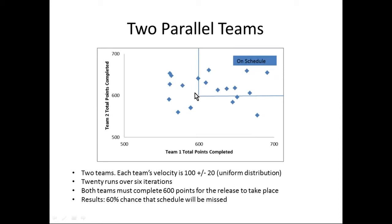This demonstrates the problems with the standard approach, which would say we'll complete 600 points on both teams and be on schedule — when in fact there's a 60% chance the schedule will be missed. What's really powerful about Monte Carlo is that we know this on day one, before the project starts. We can make a much better decision about whether to invest in it. Using the standard approach, you'd basically have to watch the situation unfold over several iterations before discovering the team isn't finishing 100 story points per sprint — spending a lot of money before making any strategic decision.